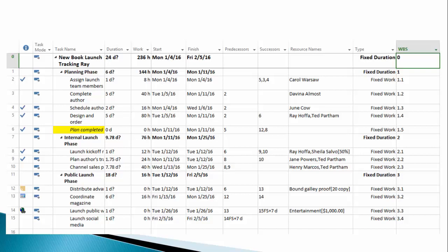Notice that Project uses the levels of tasks, with the project summary task being 0 and other summary tasks positive integers, to assign numbers. When you insert a task, notice how all the numbers below that task change. Don't save the insertion. Use the undo function.